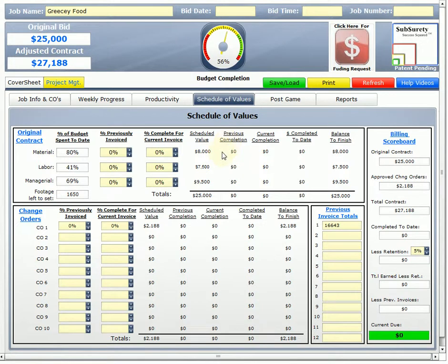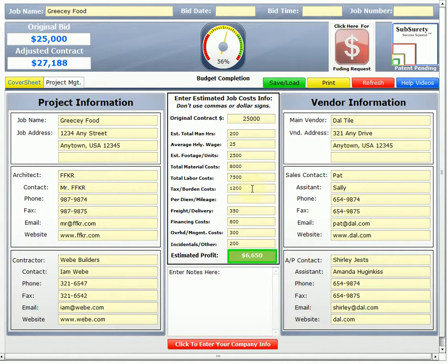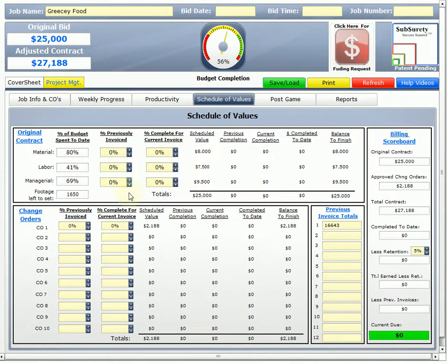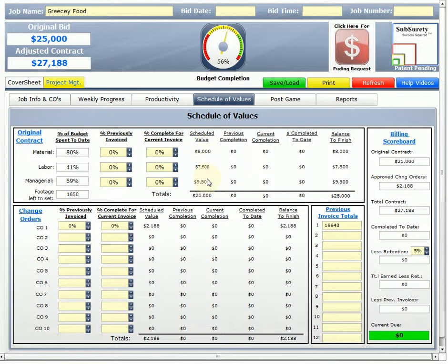As we entered information on the cover sheet, let's just go back there really quickly. In the first training when we talked about data entry, we put in our costs and we talked about if you want to have margins or however you want to determine your costs are up to you. But the tool will separate your costs into three lump sums: material, labor, and managerial as you entered them on the cover sheet. So on the cover sheet, we said $8,000 for material, labor $7,500, and it takes all the other costs and labels them managerial. That includes our profit. We still have to bill for our profit and that's part of management. The better management we do, the more profit we get. That's the point of the PM tracker. So it automatically breaks everything down into the schedule values that the general contractors like to see.